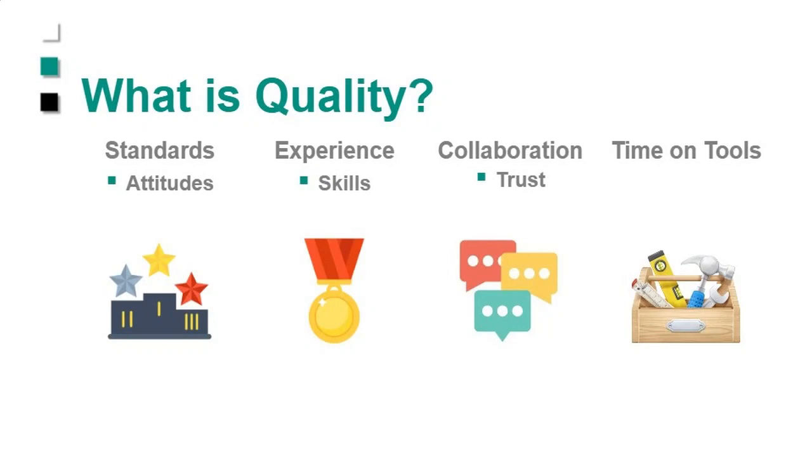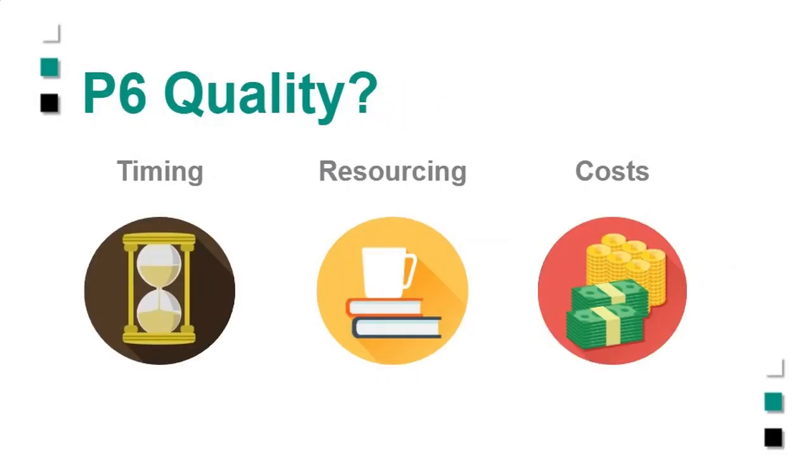I'm not sure the exact number, but let's say in the hundreds of QA points that you can use. You don't have to use all of them. You can pick the ones you want. So let's say you have to follow the DCMA standard, perhaps you'll pick those, but you might have others that you want. Okay, so we allowed the flexibility to use some standards for timing, resources, costs, and then you can put your own in place as well.